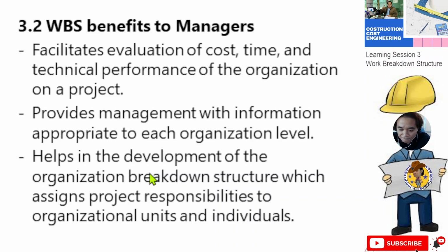is not losing. Okay, because you can see, for example, your estimate has a number of days. So you have days and you have the cost of your labor and materials, so you can see there if the materials are excess or your labor is not working well, so they are killing time. Okay, so that is why if you are a supervisor of a certain activity, you need to be experienced.